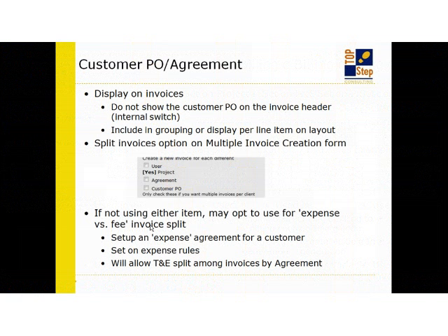Well, OpenAir actually has standard functionality that allows you to apply this customer PO to any of the customer projects, one or many. And then you can actually identify that customer PO as part of an invoicing activity. So number one, it can keep track of the balance of what you've invoiced to the customer versus what they agreed to pay. And 2, it can also display that customer PO on the invoice itself, which would expedite the whole payment activity, ideally, from the customer.